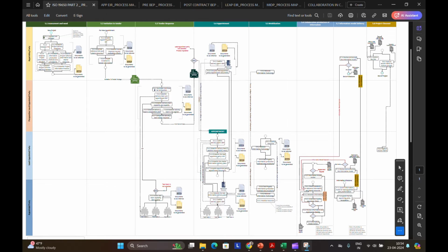Next we have the AIM, Asset Information Model. The AIM is the long-term record of the finished asset. So it's like a super detailed owner's manual with everything needed to maintain and operate the building or infrastructure after the project is complete. So the PIM supports the construction phase, and then some of its important parts get transferred to the AIM for ongoing use.